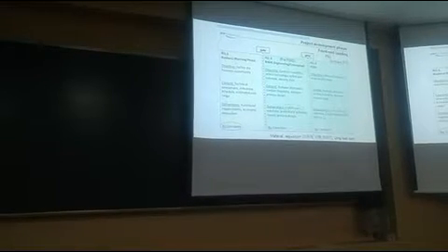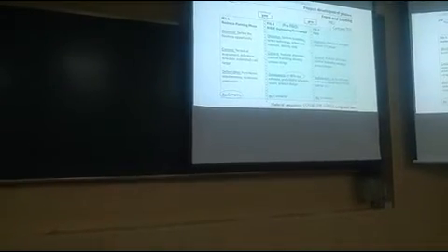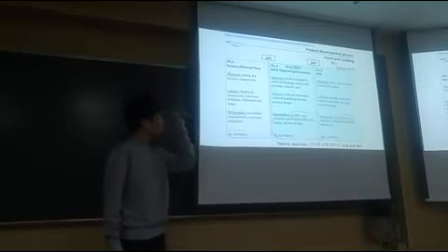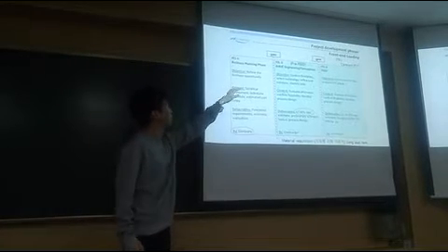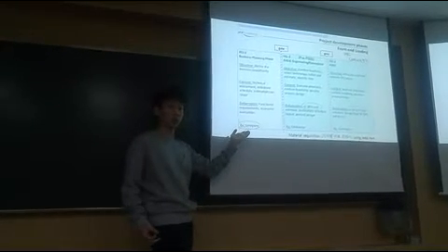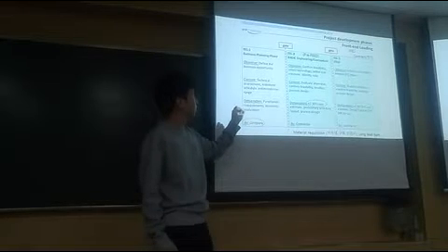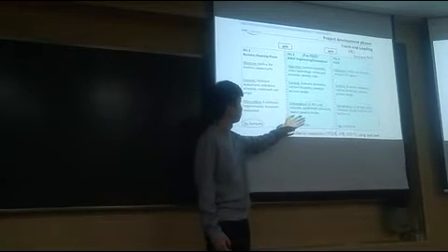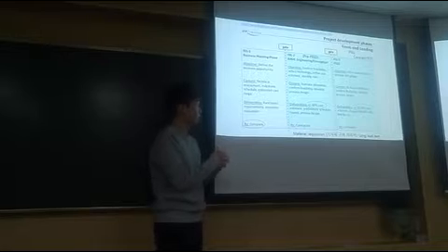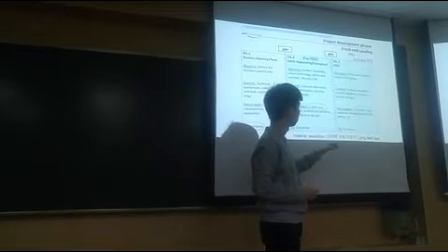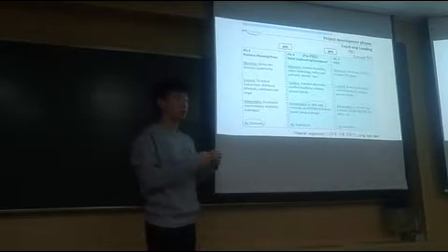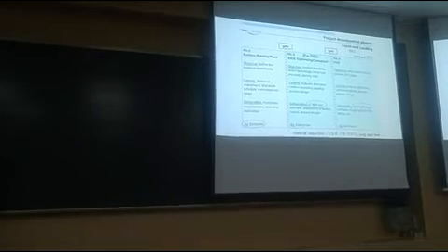So front-end loading has 3 phases. First, the business planning phase, to define the business opportunity, and this is done by the oil company client, and the client finds the engineering contractors, and they do the design more detailed and precise. And at the end of the FEED, they make a contract and do the detailed design.